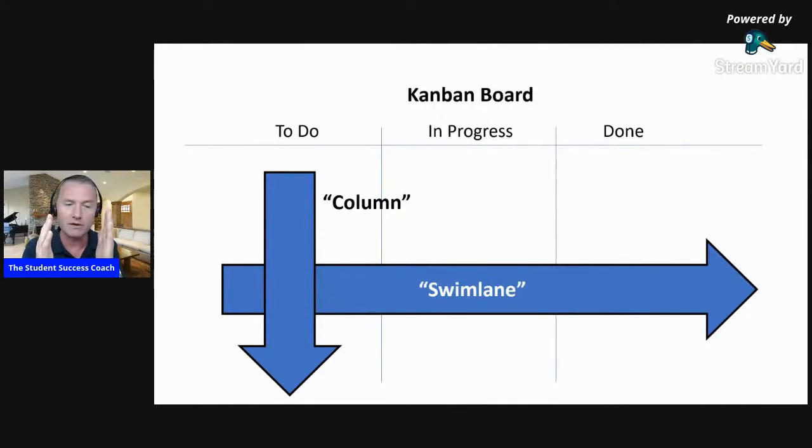So a key principle of Kanban, we've spoken about cadence, which in response to Kenneth's question is that regular rhythm, a day, 24 hours, a week, a month, whatever it is that you choose it to be, and limit work in progress. Those are 2 Kanban principles that I teach in the course and that I'm just giving you a quick overview of now. So that when you wake up in the morning, Kenneth, you get up, have a good breakfast, you've had a good night's rest, for that day, you only look at what's in your in progress column.